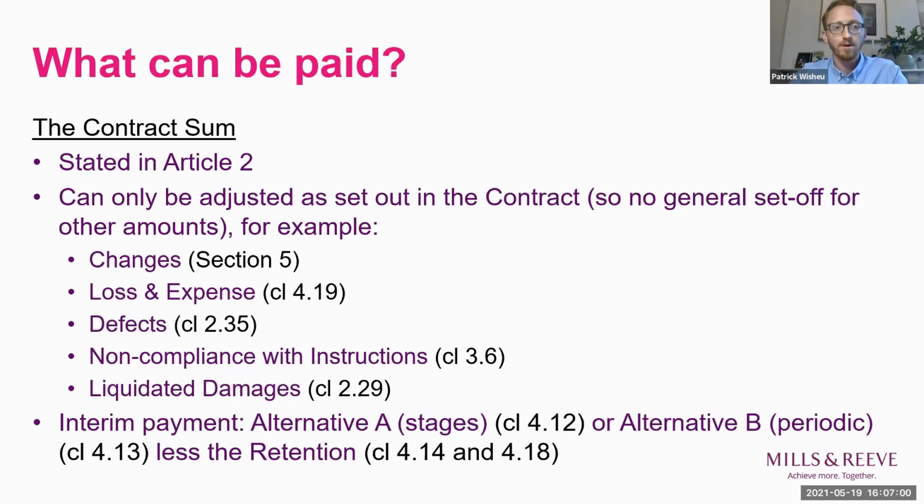And it's also important to remember that any interim payment will be less the retention, which up to PC will be the full percentage stated in the CPs, and after PC, and up to the notice of completion of making good will be half of that percentage.